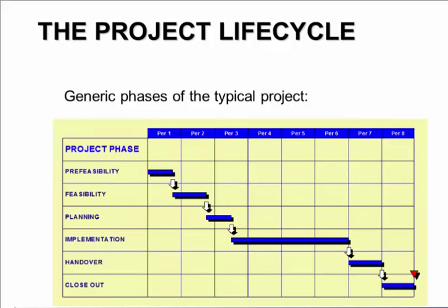That client then, in combination with the vendor, then becomes a thorough testing process, and that's part of the final part of the implementation. The testing process, which should be done in various stages, but at least should have a final test to prove that to the customer, generally on their side or before acceptance, generally after delivery of the point.